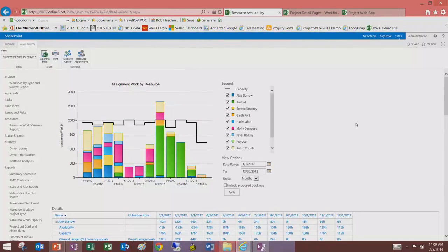And what we can see, and this is actually a really useful graph and chart. On this chart, on the left-hand column, we can see the total number of hours. On the bottom, we have it time-scaled, and then we have a black line that's called capacity. That's going to show us, for our pool of resources, our subset of resources, what's the maximum capacity our group has. Does any... Laser pointer. What's that? Oh, laser pointer.